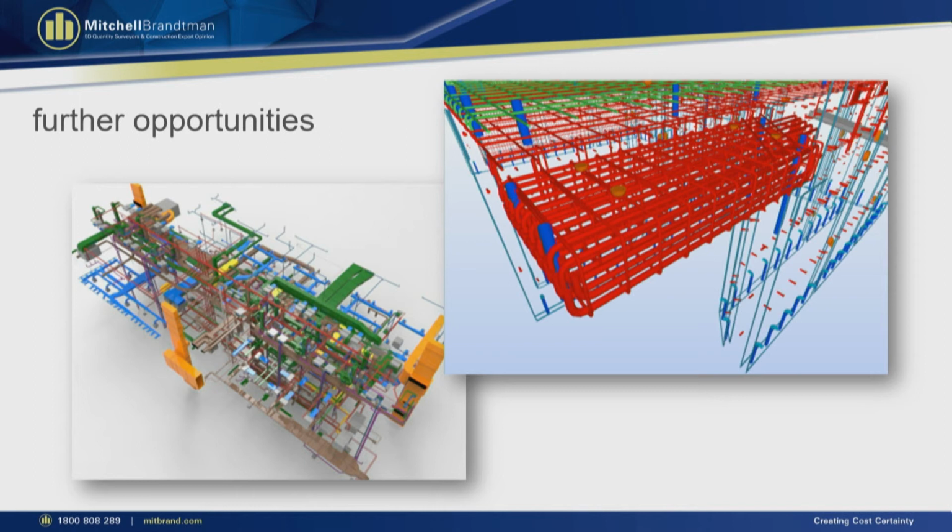We actually found one model, someone must have been bored one day, that had reinforcement bars modelled into it. So I was pleasantly surprised to find someone had taken the time to model in the reinforcement bar by bar. And I set a challenge to myself and timed myself on quantifying the reinforcement bar by bar and location by location. It took me 13 minutes. So the power of this, if the time is invested in the modelling of it, the outputs and how you can utilise that is really, really powerful stuff.